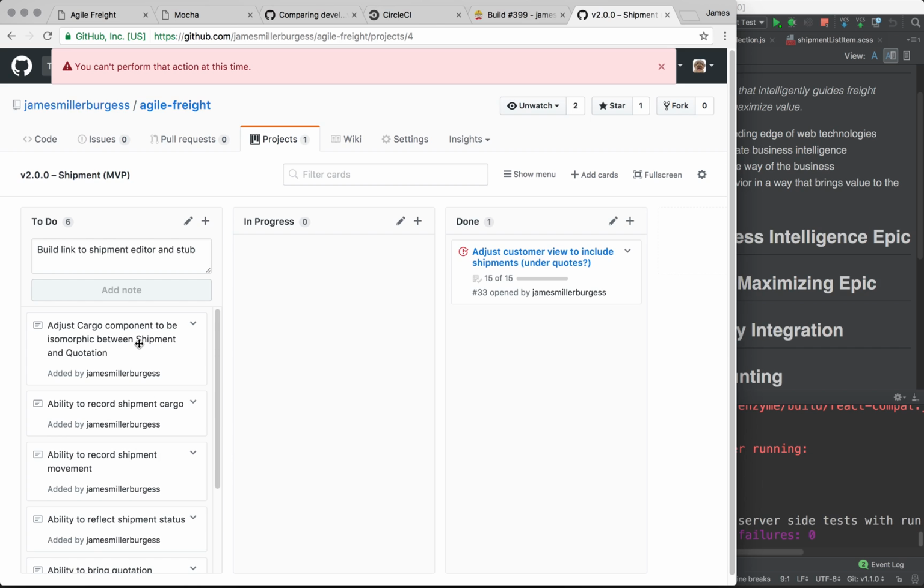And so this whole discussion is happening in the sprint planning meeting, and what I would do in that meeting is say, okay, let's take both of the items into the sprint, tentatively, and in the second half of the sprint planning meeting. So there's two parts. One is where we select the items for the sprint, and the second part is where we plan out the development of those items. So in the second half of this meeting, let's do some tech analysis of this item and find out if it's really doable in one sprint or not, based on what we found in the code and the sort of changes we need to make.